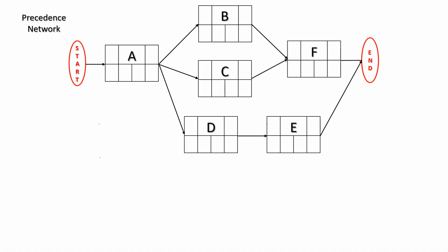So now let's go back to our little network we used as an example in the past. And the first thing we do is add the activity durations to the network. And these we'll put below each activity. Now we set the start of the project to time 0. And the first activity we're going to focus on will be activity A.